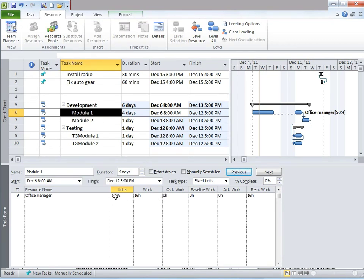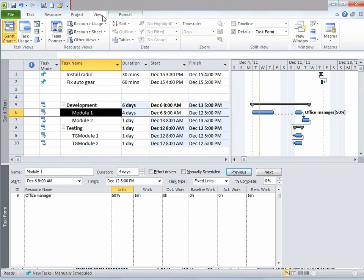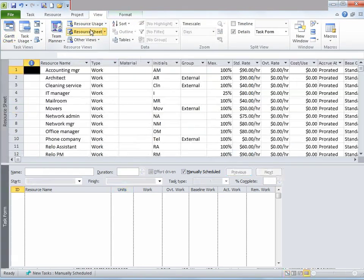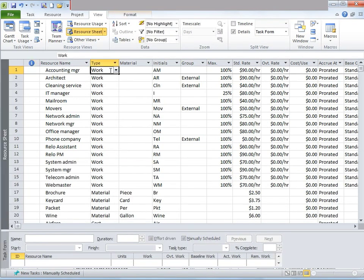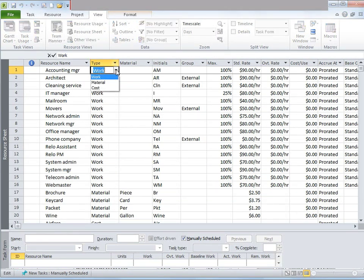This is how you can play around with the units, and how you can change the timeline by assigning multiple resources or fewer resources based on what is available to you to efficiently work through your timeline. Now I'm going to go back to the Resource Sheet under View. Notice under Type, when I click on this dropdown, there are three kinds of resources available: work, material, and cost.